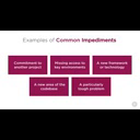More often than not, someone else in the team has already encountered these same issues and can lend a hand to help you solve the problem quickly. Whenever that happens, I would ask any of you who can help solve another teammate's problem to offer your assistance during the daily scrum. But while I will ask you to offer during the daily scrum so we all know that someone is helping, please hold the resulting breakout conversation on how to actually solve the problem until after the daily scrum is over. While we want this meeting to be a forum that enables everyone to work together, we also want to be respectful of everyone's time.